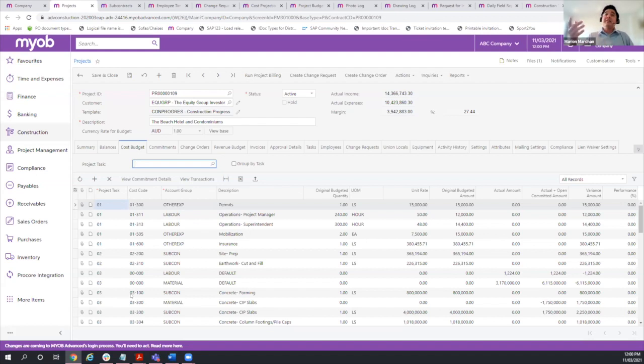Yeah, and further down to that, you can break it down to cost codes. So you can have predefined cost codes in the system. You can have what we call multiple segments of that. So if you want to have a further breakdown of your costs, you can do that in the system. It just makes your reporting, if you wanted to get more granular, easier. You can easily do a subtask, right? So you essentially are adding a subtask to the high level task. Yeah. That's right.